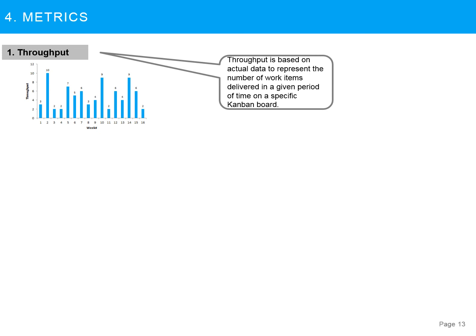There was some sort of consistency here, but later on the team was not able to finish enough items here, which led to an increase over here. But this is what it is. This is how the team is performing. You can take this chart to the team in a retrospective meeting and ask them what they make of this. They may themselves realize that their throughput is not sustainable or predictable, so they may need to do something about it.